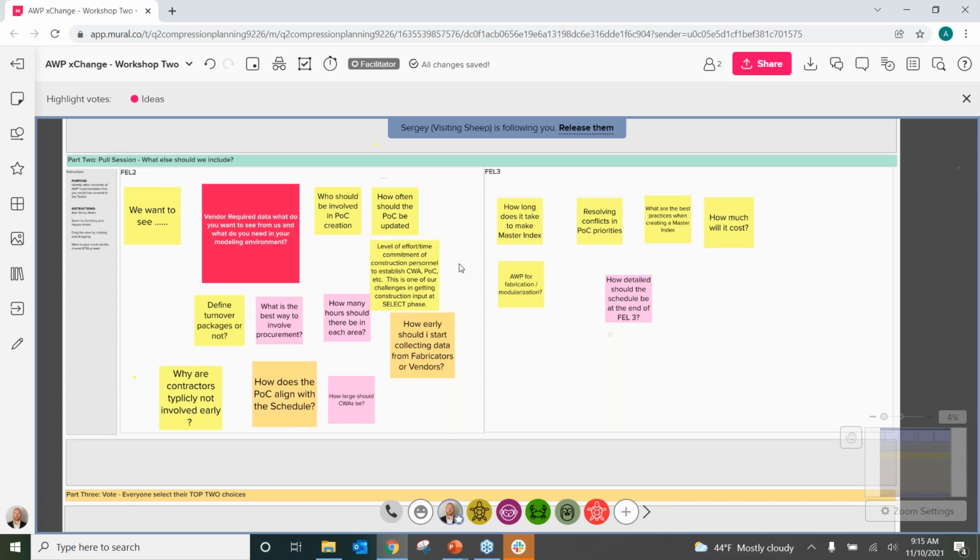Option two, look at your list of potential contractors and hire one of them to come in and help you plan the path of construction, even if you're then going to go out to bid. So you can write it into their contract to say, this is just a services contract for you to give us input to the path of construction. It does not guarantee you in any way that you're going to win the work. You can still competitively tender the bid, but you get the right kind of input from construction professionals who are actually potentially going to execute the work. So that would be sort of option two.